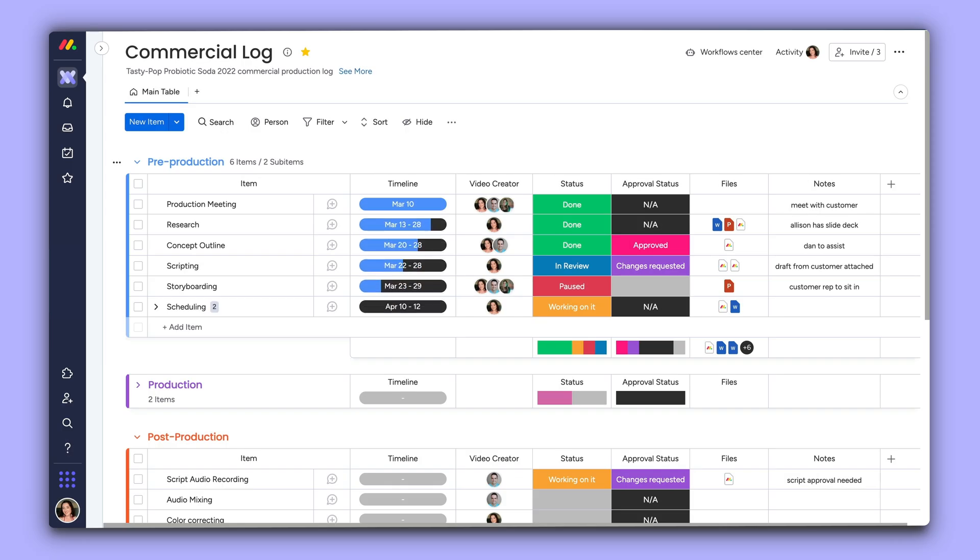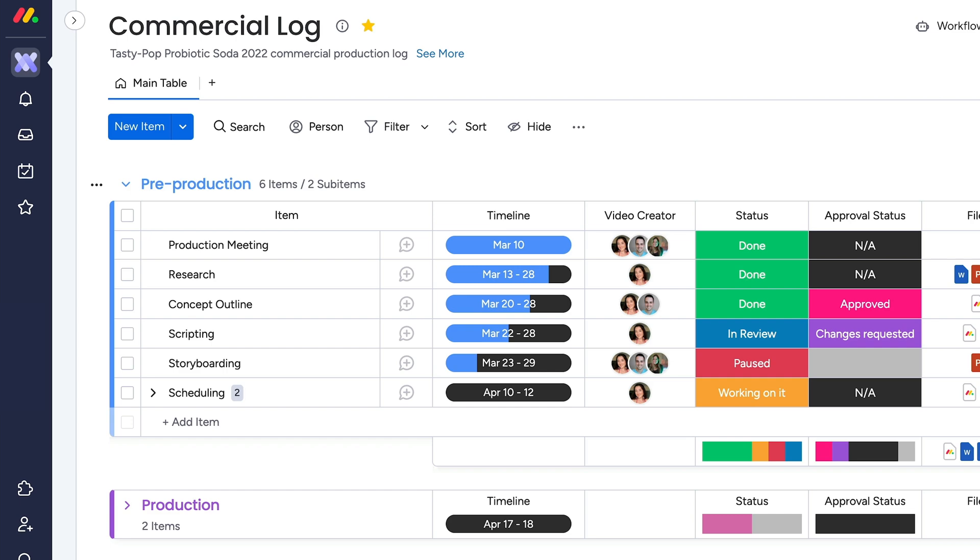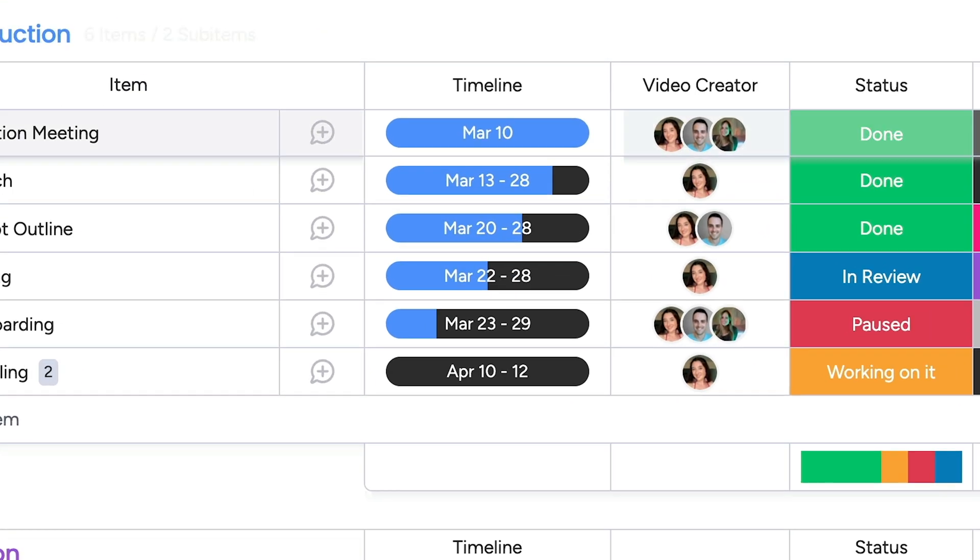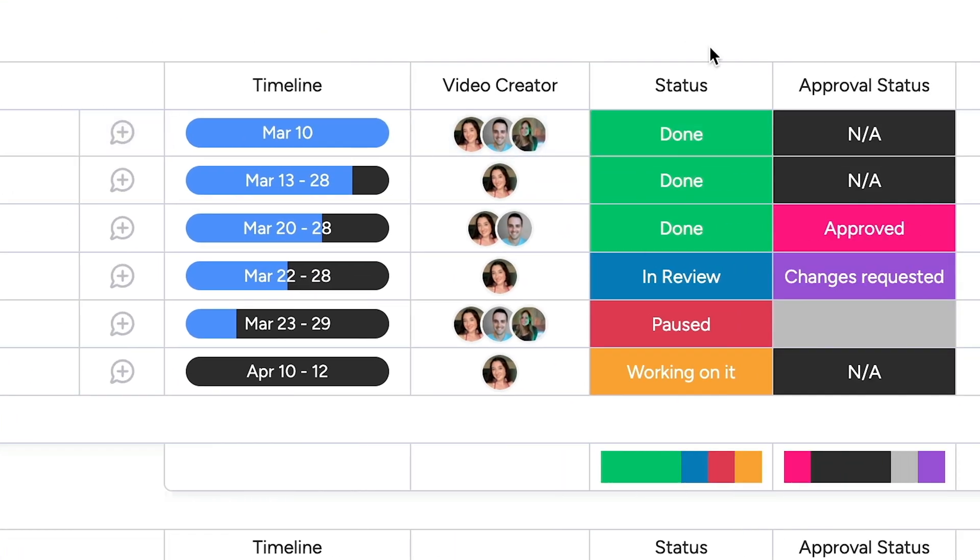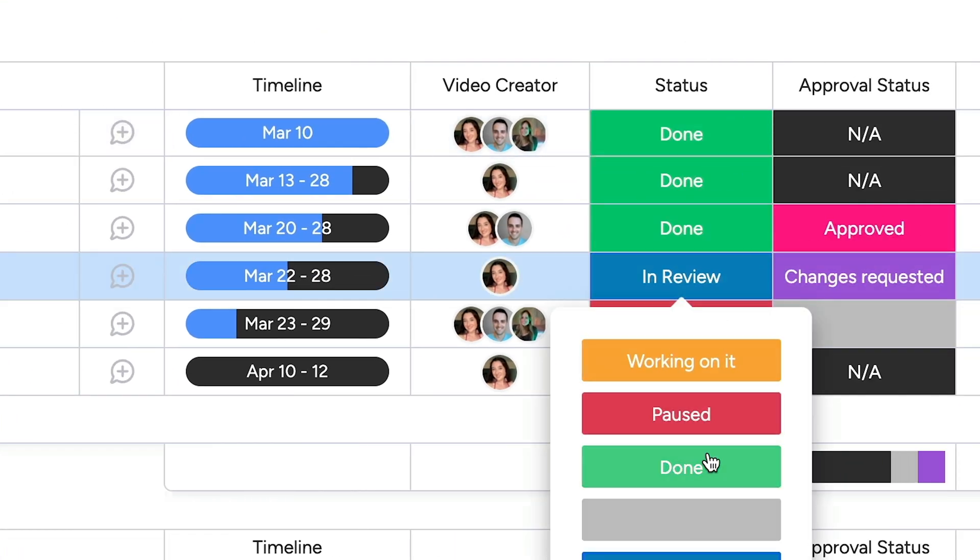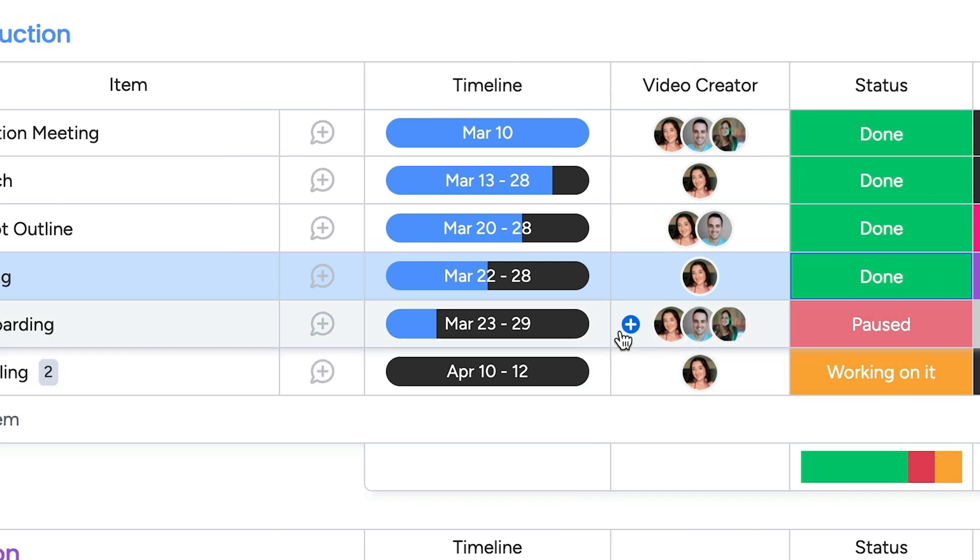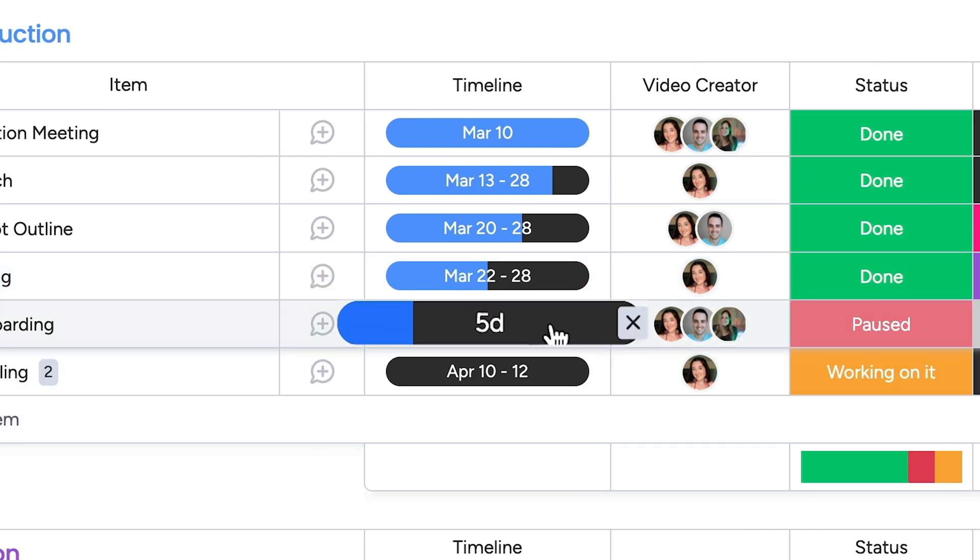As you populate your item timelines, the date ranges will display like a battery, showing the time remaining until the task should be complete. Once populated, hover over any timeline cell to see the number of days allotted.